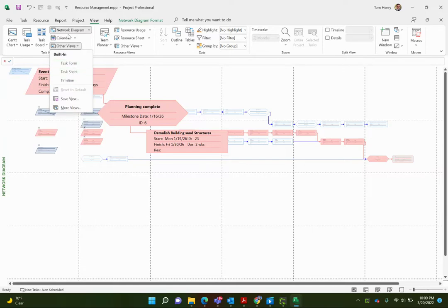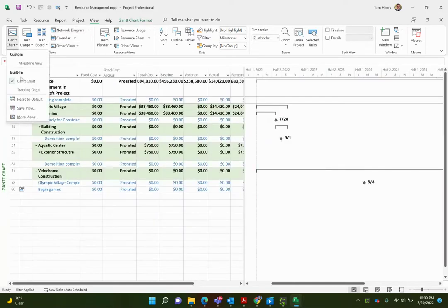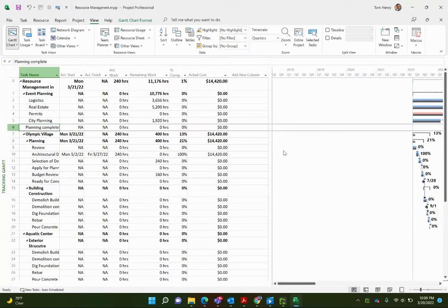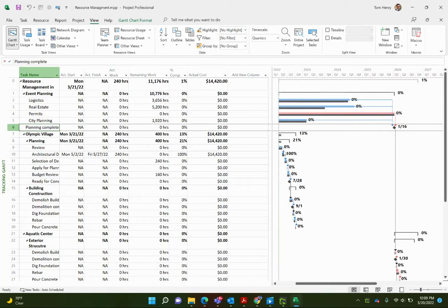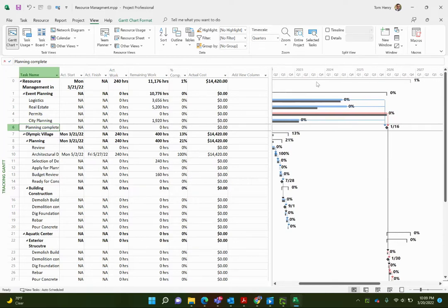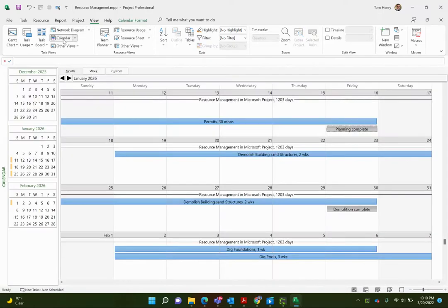Next, the tracking Gantt — found under the Gantt chart dropdown then 'Other Views.' This is similar to the Gantt chart but with a different chart view. The table used here is actually the work table with some modifications. You can see the percent complete of tasks, whether they're critical, and the baseline of those tasks versus where you are today — so you can see which tasks are running late compared to baseline.